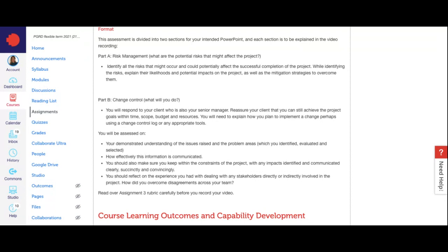Erica: It's good to actually highlight that, because the problem is some of the clients would want you to extend what you agreed on. So first of all, you can actually start with saying that this is beyond the scope that you initially agreed on. And second, if you were to do that, this would have to be changed to additional budget, additional time, and additional scope. And that would extend your input for that particular project.